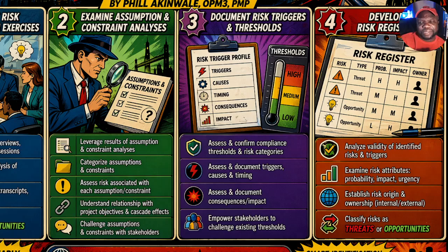Well, the risk register contains a lot of information. It should contain the risk score. It should contain the probability, the impact rating. You could go a step further and we go into quantitative risk analysis, which is a quantitative measure of the risk and going more into dollars times percent. And that gives you the expected monetary value. That also needs to be in your risk register. So we're thinking about identifying risks, putting that in your risk register, doing a qualitative risk analysis, putting that in your risk register, doing a quantitative risk analysis, putting that in your risk register.